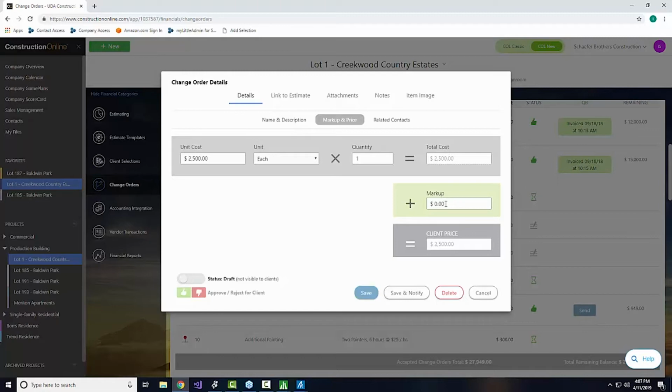And most importantly, it gives you the place to put in your special client tax. If you have somebody who's making a lot of these change orders and you want to start to price them in such a way that they'll think twice about that, I found that in some cases it's a good deterrent for somebody who keeps changing their mind. You start adding in a slightly higher markup every time they change their mind, and you've got to get these things approved. Again, it may or may not cost extra to do that, but they're having long conversations.